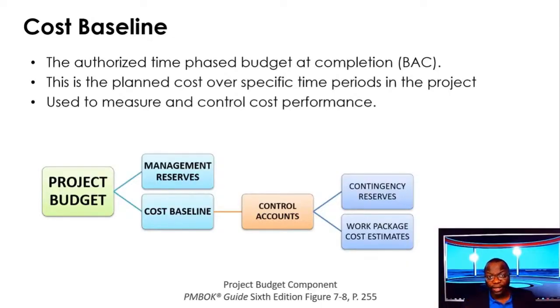So if what I'm speaking about is like Greek to you, then it means you need to go read chapter 5, scope management, and understand the hierarchy: root node, control accounts, other WBS components, but then you've got planning packages, and at the bottom you've got work packages.